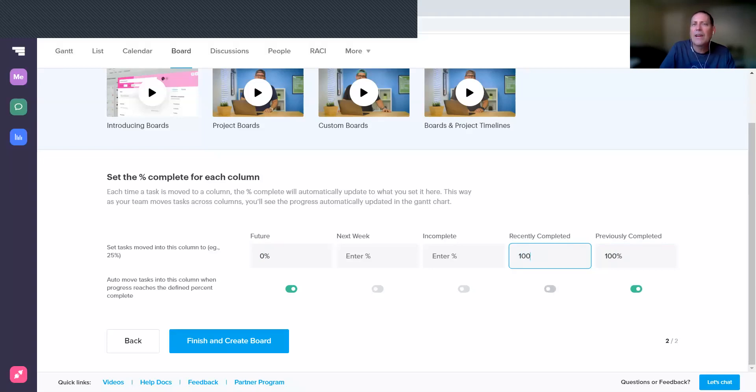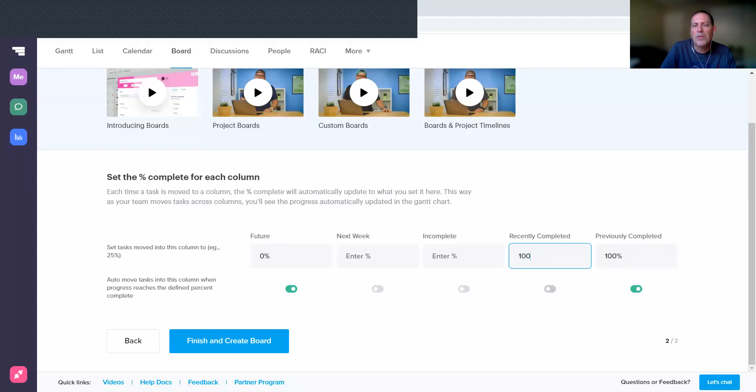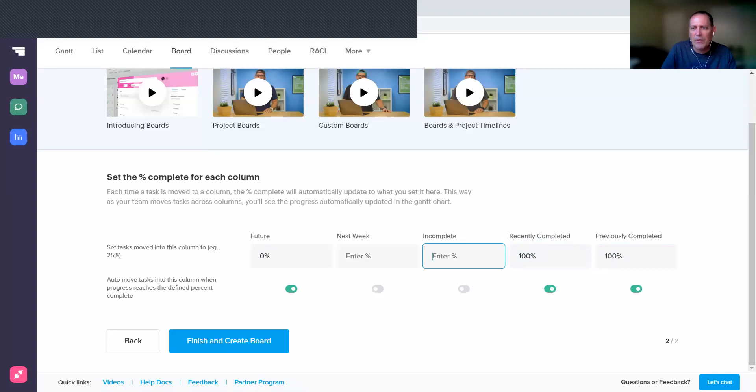And then Next Week and Incomplete—Next Week likely is zero percent but may not be, you might have started something earlier, so we're not going to put any percentage there. Incomplete could be anything between zero and 100, but for simplicity I'm going to go ahead and set that to 50%.